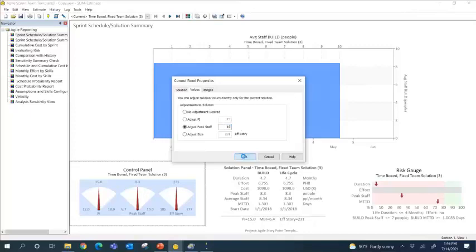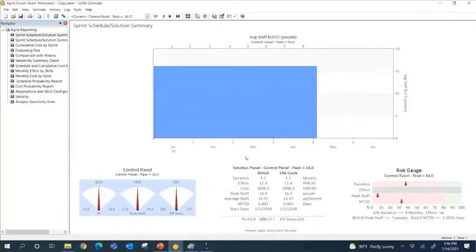I'll say okay. And then boom, within seconds, I've got a whole new estimate. It shows me I doubled the staff, added that extra Scrum team in, but I'm only saving 2 weeks. Instead of 10 sprints, I'm delivering in 8.5. It's going to throw my cost up to $1.8 million. Is that worth it? At least now we have the analytics to talk about it, right?